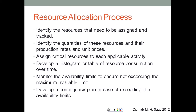The resource allocation process involves: identifying all resources to be assigned and tracked; identifying quantities, production rates, and unit prices; assigning critical resources to critical activities first; developing a histogram or table of resource consumption over time; monitoring availability limits to ensure the maximum is not exceeded; and developing a contingency plan to reassign peaks to areas with lower demand, achieving a smooth resource distribution.